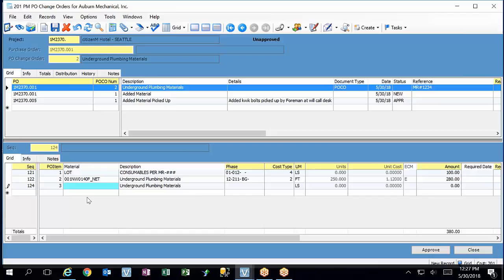Yeah, so what I would do is I would actually go back to the PCO form or the ACO form and do an internal change order and just move it, like say, okay, from here to here. Okay. And then that's all done. Then the dollars are in the right place. Okay. And it's documented. That was our process at Turner. I was just hoping that can become an easier way? Yeah, it can become cumbersome.